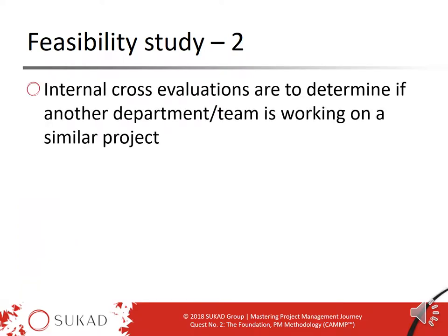The first factor is what we call internal cross-evaluation. In large organizations, large government ministries, and others, it is likely that more than one department or division could be working on the same type of project, resulting in wasted effort. So the first step is to verify whether any other division or branch is working on a similar project. If no, great — we can continue. If yes, we need to figure out what to do: maybe cancel one, or synergize and combine efforts. This is a simple exercise to ensure nothing else competes with this project.